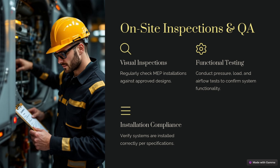The next one is functional testing. Once you finish the installation inspection, the next procedure is testing — such as pressure testing for plumbing or chilled water systems, and for electrical, tests like the megger test, among many others. Once installation is approved, you need to ensure testing is done correctly at site and get approval. Once you are satisfied with the internal inspection, you can proceed with the consultant inspection.